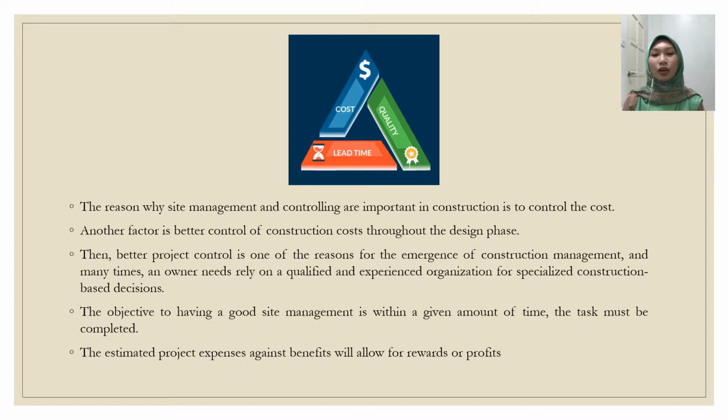The reason why site management and controlling are important in construction is to control the cost. Another factor is better control of construction costs through the design phase. Designers used to create bid documents without having true, accurate cost information. If the bids obtained were too exorbitant, the owner had two options: increase the budget, typically using his or her contingency, or redesign the project.